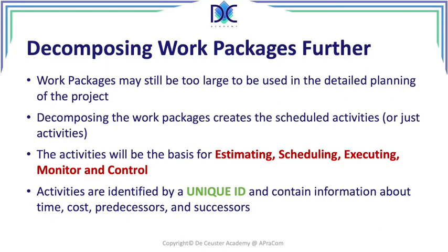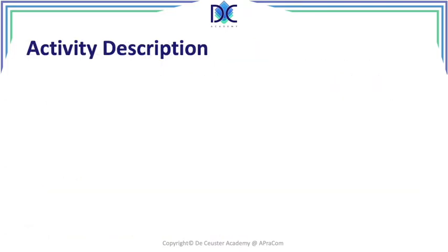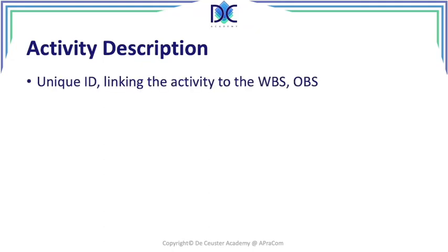We can add information about who will be doing the activity. There are different possibilities of information we can add to activities. They are the basis for creating the detailed plan and we will use them when using the precedence diagramming method or different ways to create a project diagram or project schedule. Each activity has a unique ID and we can link it to the WBS and the OBS — the organizational breakdown structure — so we link the activities of the WBS to the organizational structure.